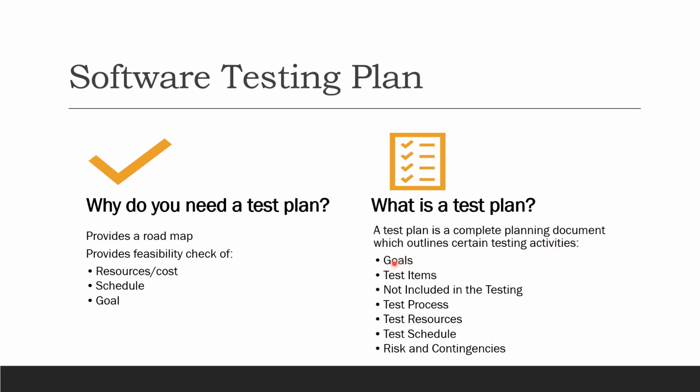So as a team, say, in a waterfall model per se, you have a 6 months project. And in this 6 months, you're gonna have 1 month to do the testing. So before that month is up, or at least a month before your testing month begins, you should already have the test plan created.